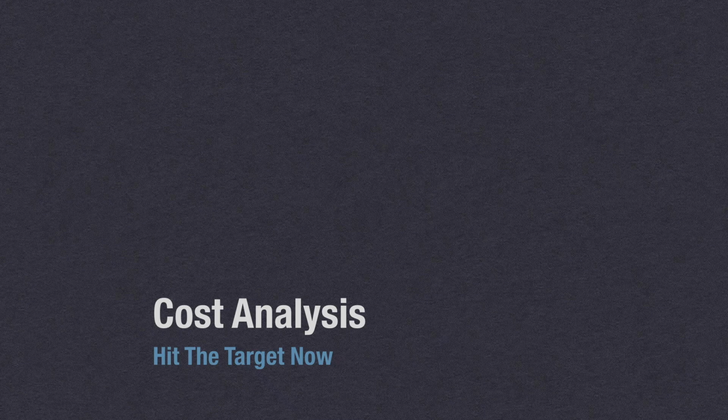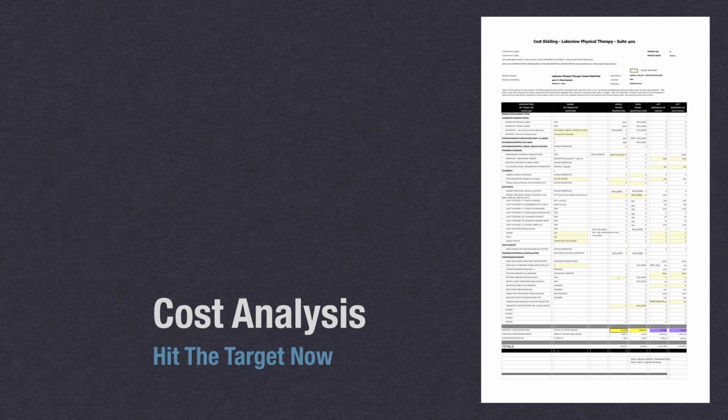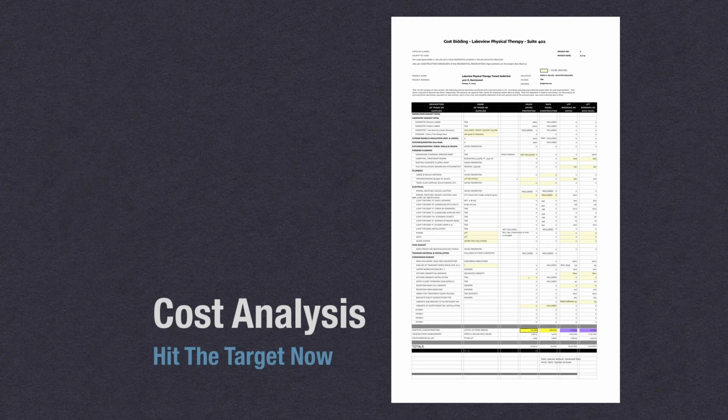So I like to get a handle, or shall we say a litmus test, up front now, early in the process, so that we don't go further until we've done our due diligence. So we will typically call in a builder. Could be someone you know, it could be someone we know, and we'll ask them to do a cost analysis, budgeting items for each trade and material allowances to get us in the ballpark of where the current design is going to fall. And then if we're under budget, great, we'll keep marching forward.